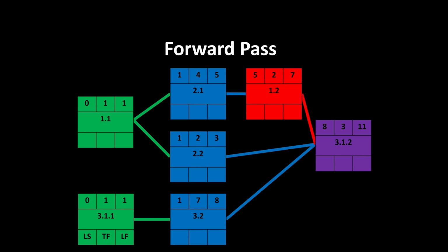Now this gives us a really useful piece of information. Not only have we got the linkages, not only have we got the durations, but if we start the green ones now, we know the earliest possible time we could finish that purple one, which is in 11 days. So how long is our overall project going to be? The earliest we could possibly finish is after 11 days. We need 11 days to do this project.